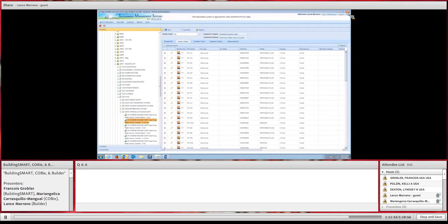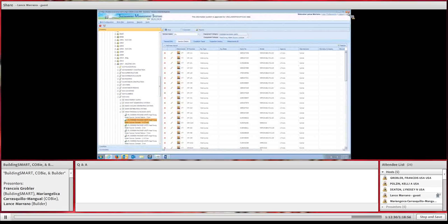There are some other things that we demonstrated with the Air Force and with the Army, in the pilot here at Fort Hood and carried on at Fort Campbell as the second site, where because we have a standardized design, we were able to build a template of that standardized design and apply that to multiple buildings of that same design, and then just go in and do inspections, and that was a dramatic time saver. I think that in the case of Fort Hood, they were able to save about 20% of their original estimated level of effort just by implementing templates, and that was only for barracks.